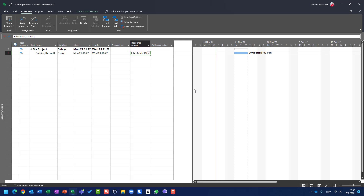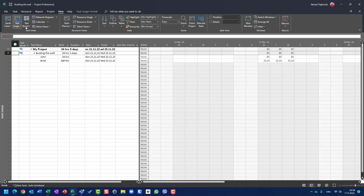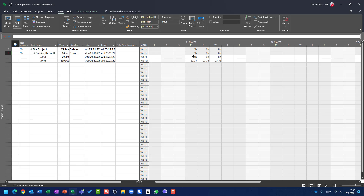One interesting thing to show you: if I go to View and then Task Usage view, you will see that John is supposed to work eight hours per day. Since I have 100 pieces over three days, they are distributed equally. According to Microsoft Project, John will use 33.33 bricks on Monday, 33.33 bricks on Tuesday, and the same amount on Wednesday.